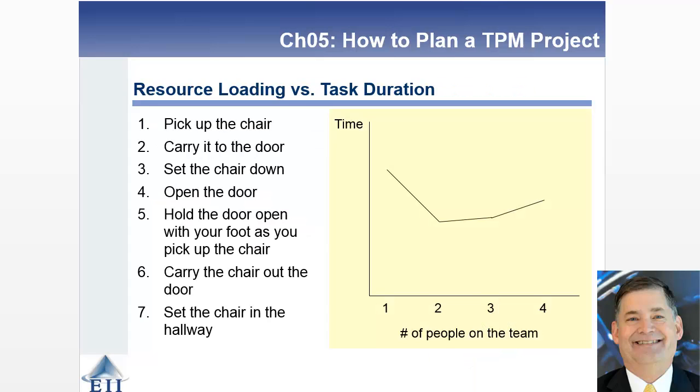All right. The other thing to think about, and this is actually a pretty big idea, is that you need to be careful that you don't add non-value added processes to a project. And sometimes adding people to a project late in the project will just make the project later. Okay. And Fred Brooks talked about this in his book, The Mythical Man Month. Great book to read, by the way.